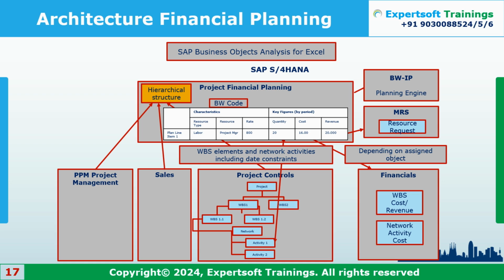Right. So that's the solution I was giving to every one of my customers. They will write a small piece of program. Every month the system will check whenever a new version is coming or the data has changed in my cost plan. Automatically, based on that version, it will put the data into, or supplement, or maybe transfer the data into your budget.